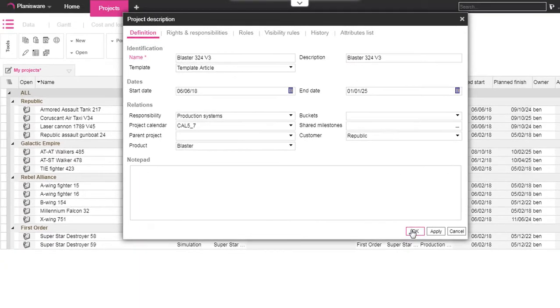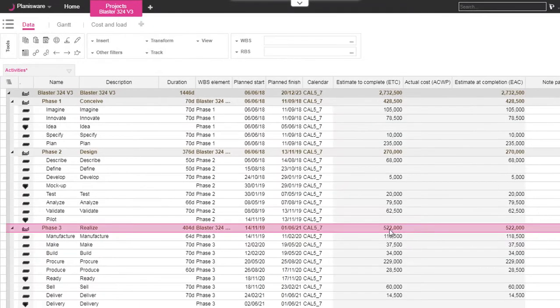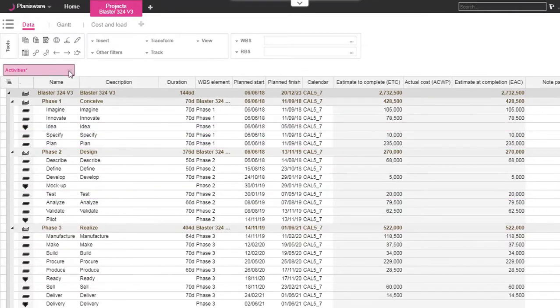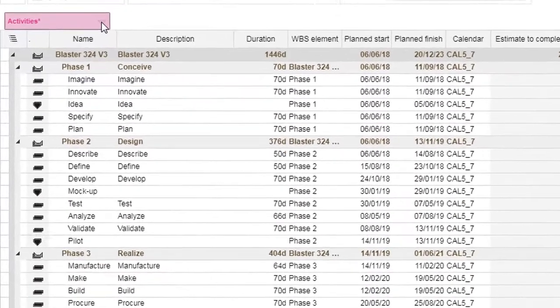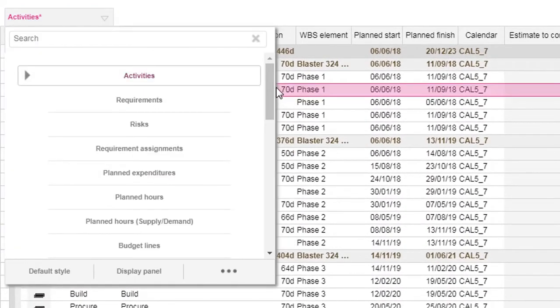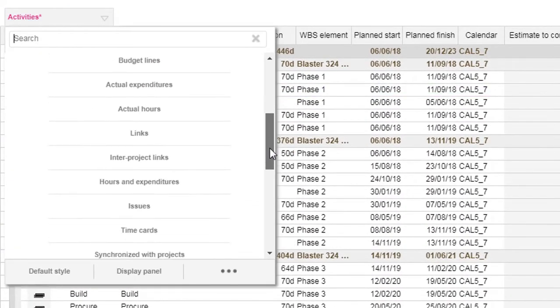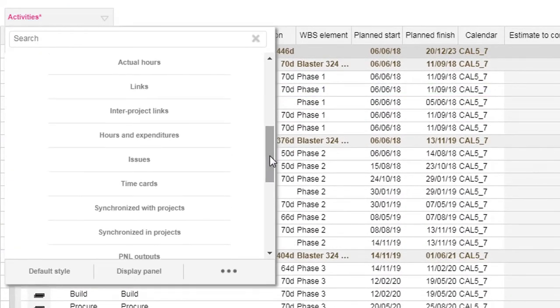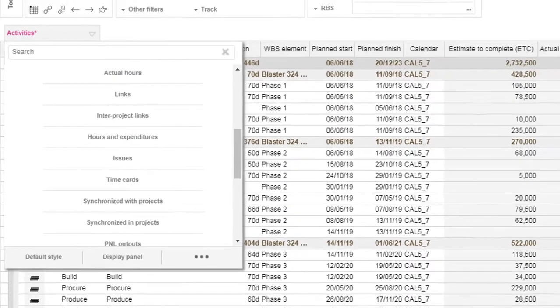Creating the project will automatically open it. In the data sub-model, we access all possible project data in simple tables, for example: activities, planned hours, and activity links.